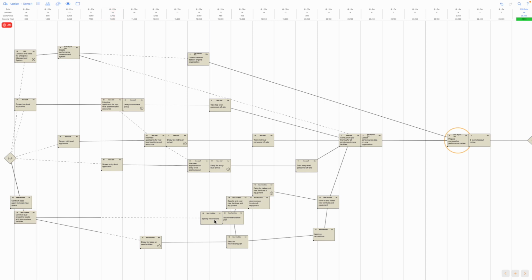End First Planning places all tasks as late as possible when creating the initial schedule. This creates the shortest possible plan within the logical constraints. It deliberately leaves all the usable float upstream, which is often needed to resolve resource conflicts. The final step is to optimize the plan by shifting tasks from as late as possible to as soon as possible. While protecting the resource solutions, any available float is transferred downstream in the plan.